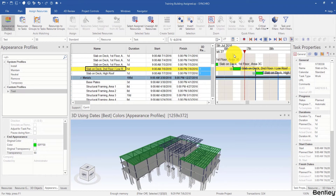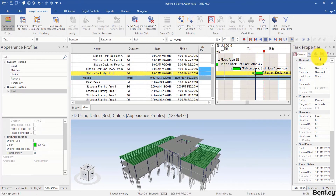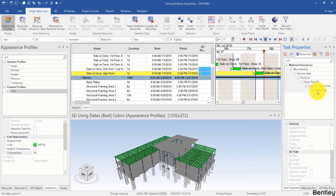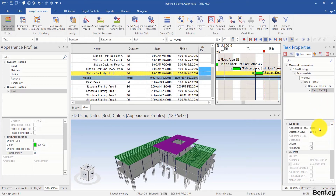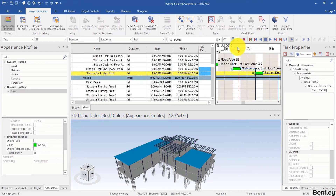Our next topic is how to change the appearance profile for a resource that is already assigned to a task. For example, the high roof is using the Install profile. Even though I change the profile from the panel, it does not change the profile the resource is currently using. To change it, I need to go to Task Properties > Resources, select the resource — which is the high roof — and then change the profile from Install to 'test'. Now if I drag my focus time along the timeline, both high roof and low roof are using the test profile.